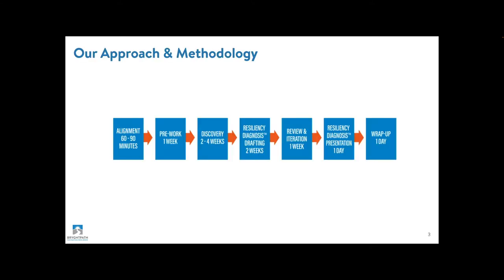You can best describe our approach methodology in this way. We have a very defined timeline broken out into phases: starting with alignment, fully understanding the scope of the effort, moving through pre-work and review of documents, two to four weeks of discovery, followed by about two weeks of drafting our resiliency diagnosis report, a week of reviewing and iterating that with you, a day of presenting to you and your stakeholders and senior leaders, and then about a day to wrap things up. In most cases, this engagement lasts from four to six weeks — occasionally eight weeks — depending upon the complexity, size, and scope of your organization.